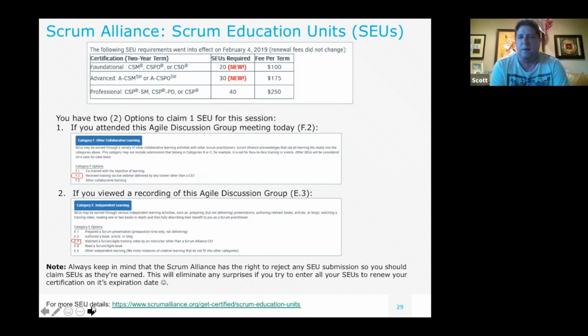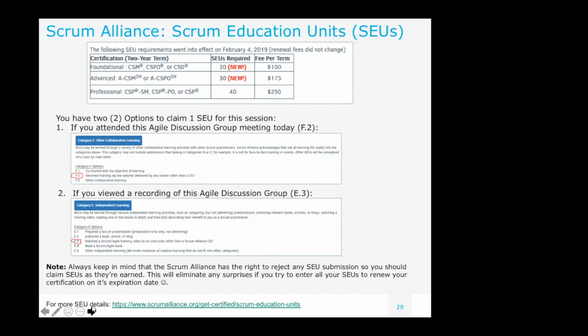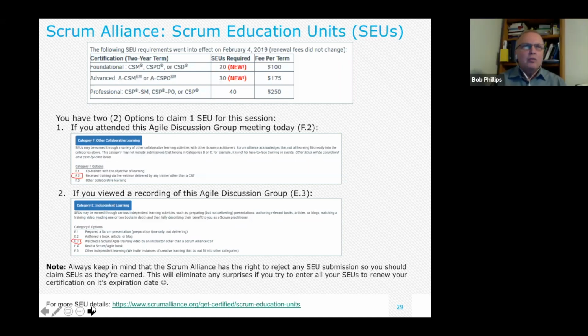I have a question. Sure. You mentioned planning poker. Is that software that everybody on the team, Pune and Jersey, has? There's story point cards, and it's called planning poker. When I do it, I use cards. When Pune did it, there's a phone app that people can bring up on their phone and pick one of the numbers from the Fibonacci sequence. So everybody could see it at the same time, so this way nobody is influenced by someone else's numbers?